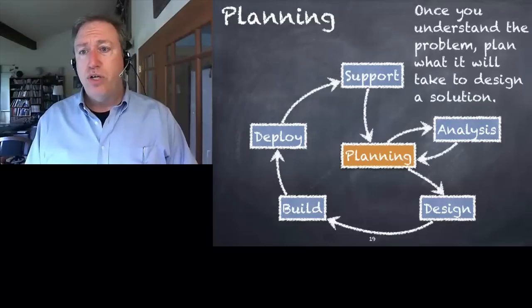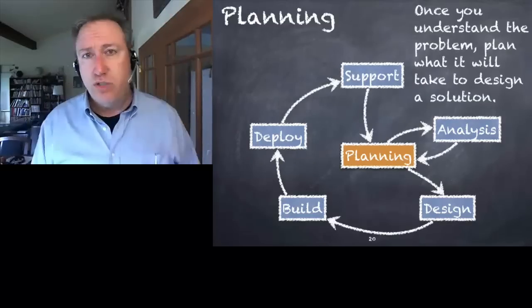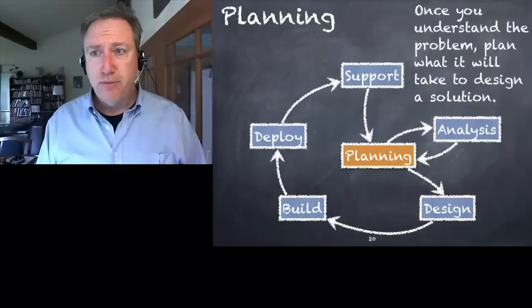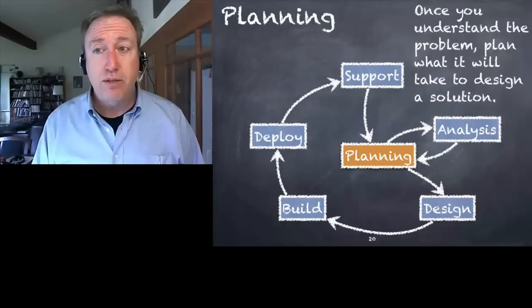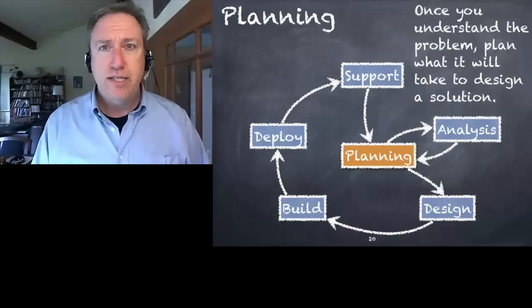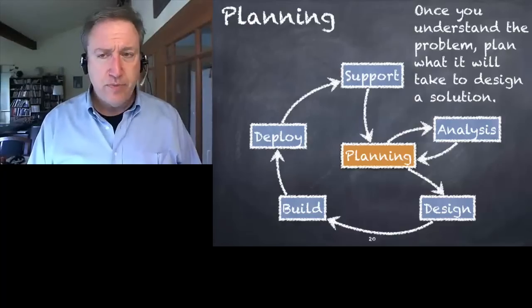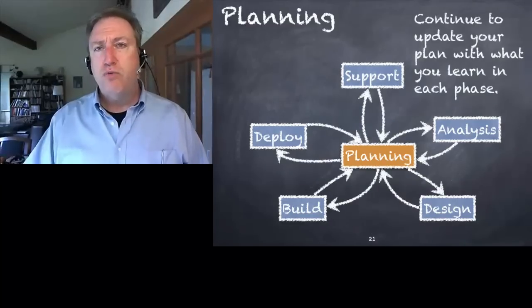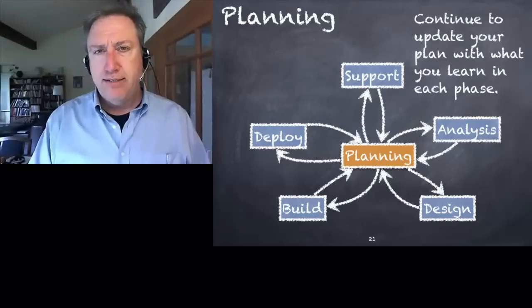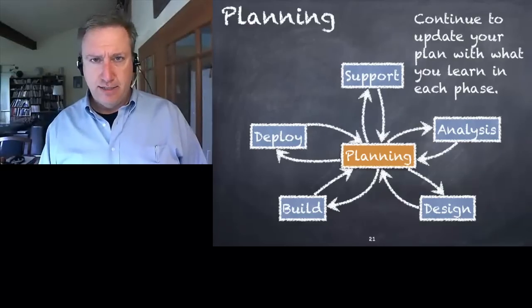You go through and you do your analysis, and you understand the problem in greater depth. Now you go back to planning and you decide, well, now that we know about the problem, let's plan what it'll take to do a solution. And similarly, every time you go through a phase, you replan. It's called a stage gate system.